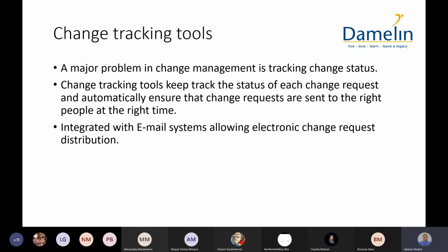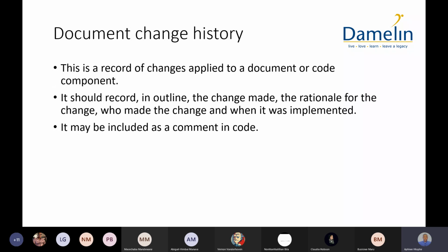And then once they've completed all the required components of that form, an email is sent to the change request board or a particular member in the change request board for evaluation purposes. So we can do this in an electronic manner, and it's very good when you do it in an electronic manner because tracking the status, whether it is rejected or approved, becomes more organized and structured.